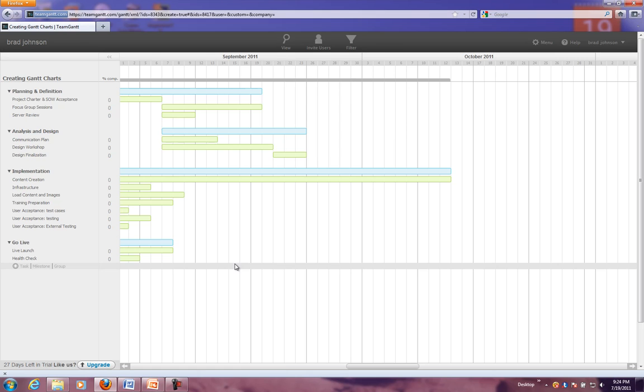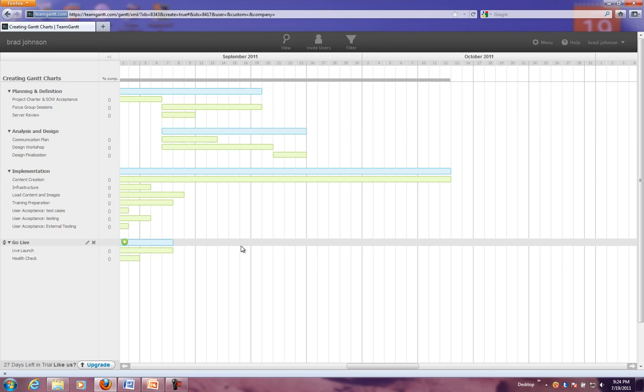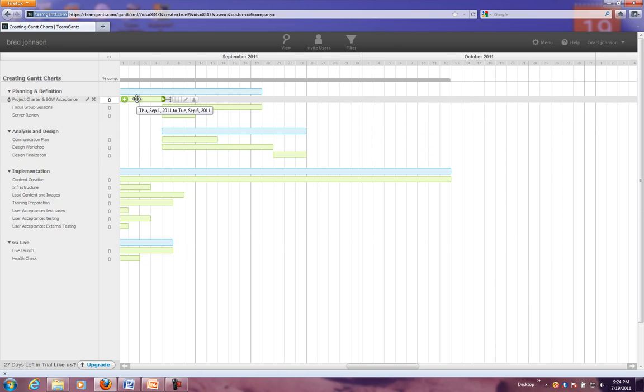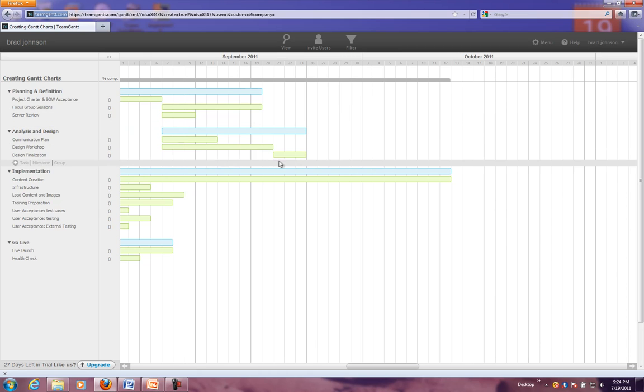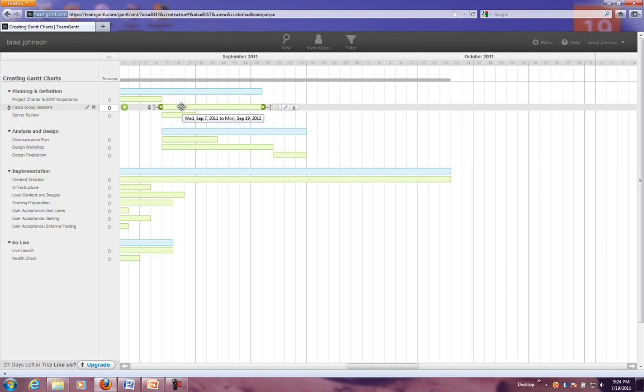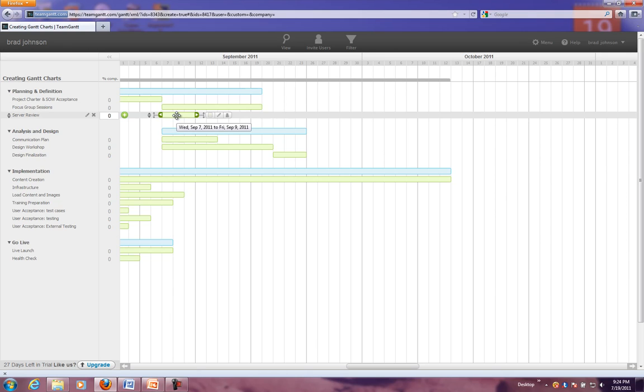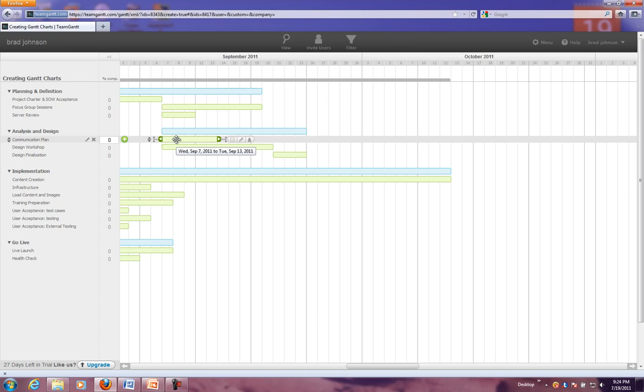Okay, now have a look at the consequences here of the project that we're looking at. First of all, because of this at the beginning, we really can't start the project until somewhere around the 7th of September. That's a full 7 days. Now, we've sort of suggested that all of these, except for this one, could start at the same time. That means we need to have enough resources to man each of those things. So we need to have someone or group of people doing the focus group sessions. We need someone else to do the server review. We need someone else yet to work on the communication plan. Right? And we need someone else to do the design workshop.